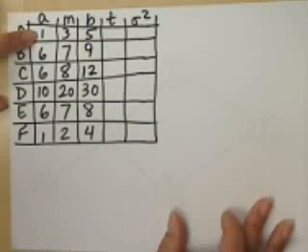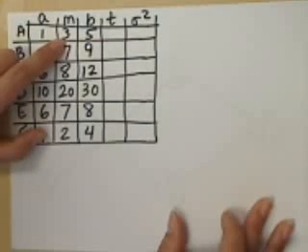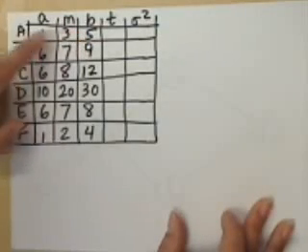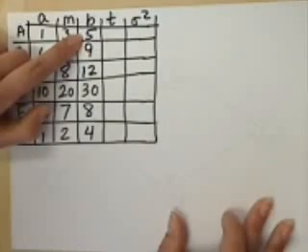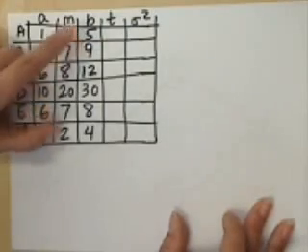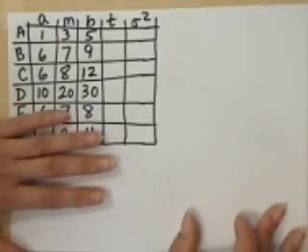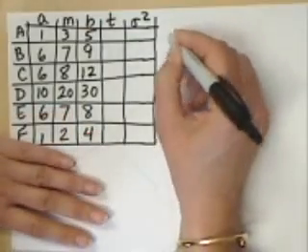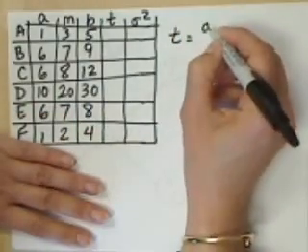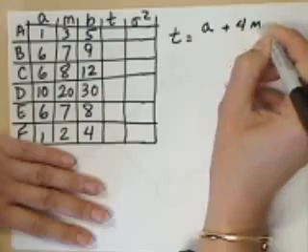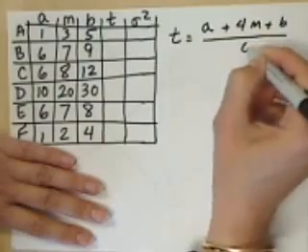This is the best case scenario or the optimistic time. Then you have the most likely or the most probable time estimate, and then you have the longest time that the activity might take, or the worst case scenario or the pessimistic time. Your book says that you can average these activity times. The formula given is T is equal to A plus 4M plus B divided by 6.